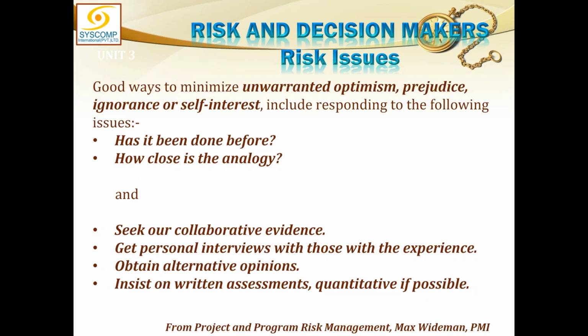Then seek out corroborative evidence. Go out in the market, ask questions of people, consult with subject matter experts, and collect data. Base your decisions on data, not on optimism, not on prejudice, not on ignorance or self-interest. Get personal interviews with those who have experience. Obtain alternative opinions. Ask them what can be done if this room catches fire. Insist on a written assessment, quantitative if possible. So you have to consider all that.